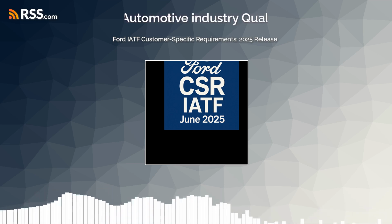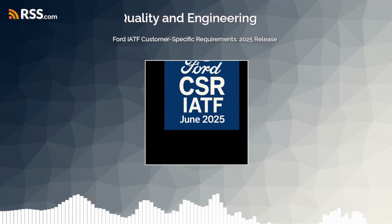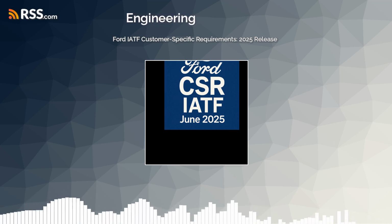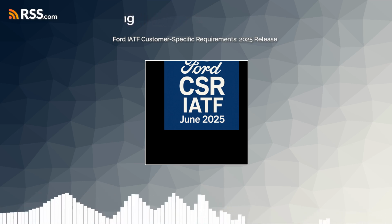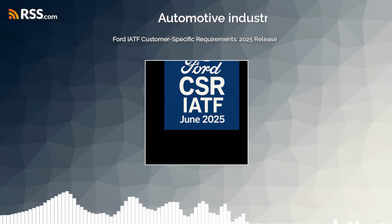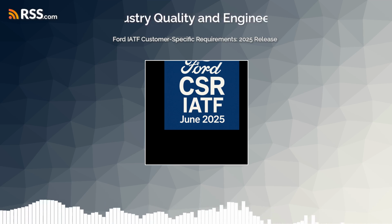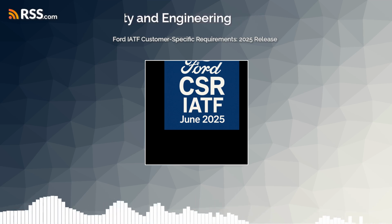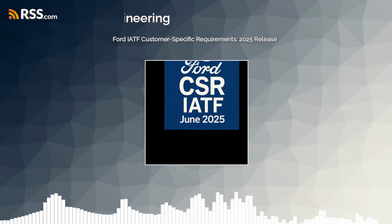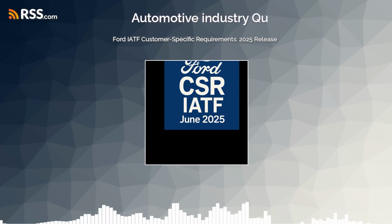And the document also integrates GPDS milestone reviews here. Yes, for critical characteristics parts, design-responsible organizations must include representatives from Ford Engineering, Assembly, and Manufacturing in relevant GPDS milestone design reviews. They are also encouraged to do this for all parts where it's feasible. It's about ensuring cross-functional input from Ford throughout the supplier's design and development process, especially for critical items. Get everyone looking at it. Collaboration is built right in.